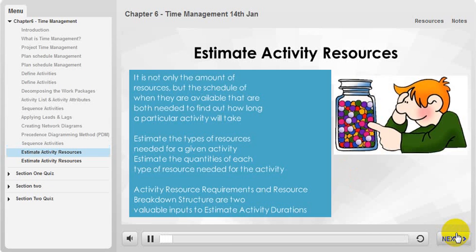Decomposition is a technique used for subdividing the project deliverables into smaller, manageable tasks called work packages. The WBS is a hierarchical structure with work packages at the lowest level of each branch. Based on their complexity, different deliverables can have different levels of decomposition. Beware of excessive decomposition. It can lead to non-productive management efforts and inefficient use of resources.